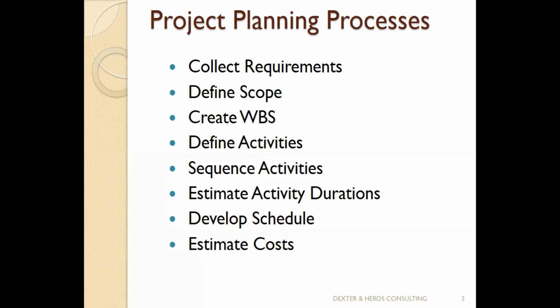I'm going to rearrange this later on. Ideally, after sequencing my activity, the next thing I'm supposed to do is estimate duration. But if you ask me, for example, Amadi, how long will this take you to do? I'm going to throw the question back to you and say, Jane, how many people are you giving me to work with? I can't answer how long until I know what resource is available to deploy.